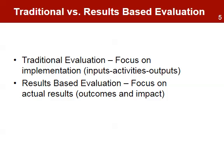Traditional evaluation is focused on compliance. It seeks to know if the project used efficiently the inputs to deliver the expected outputs, assuming that a successful implementation is equivalent to actual improvements in the condition of the beneficiaries. Results-based evaluation increases its scope to evaluate actual results — it seeks to know if the implementation of the project is producing or has produced the intended results.